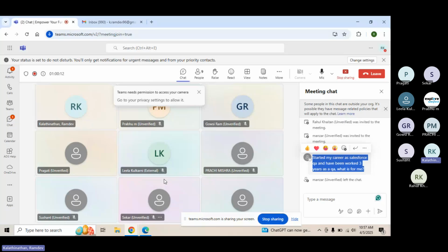See, it's a very generic question, Pragati, and there are no right answers to this. But I've seen such scenarios happening in the industry where the customers might say, no, no. Let's say I am going to charge you for 100 hours, assume maybe 20, $30 per hour, something like that, and the customer says he's not ready with that budget. Now, internally, what you will need to see is if I reduce one or two resources, will I be able to deliver it at the cost that the customer wants me to?